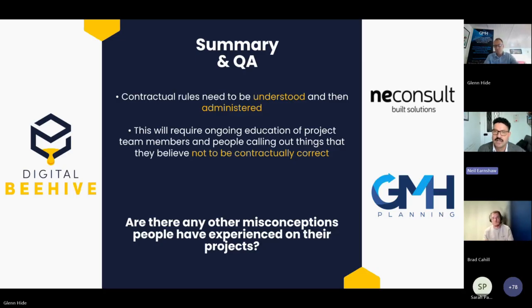So yeah, key dates, and I have to say the drafting in 25.3 isn't the best drafting. I did write an article on this subject a few years ago, Glenn. It's on my website and my LinkedIn profile, but it isn't clear because it says additional cost, so that must exclude loss, consequential loss, because it says cost, or does it? It also says on the same project.